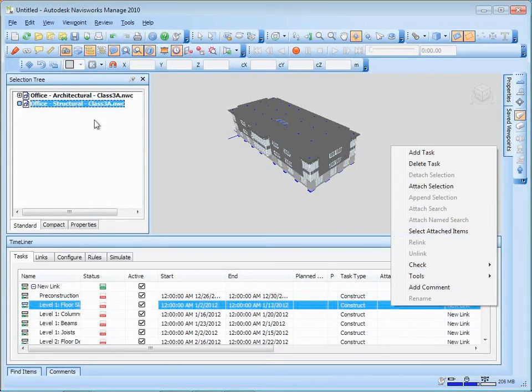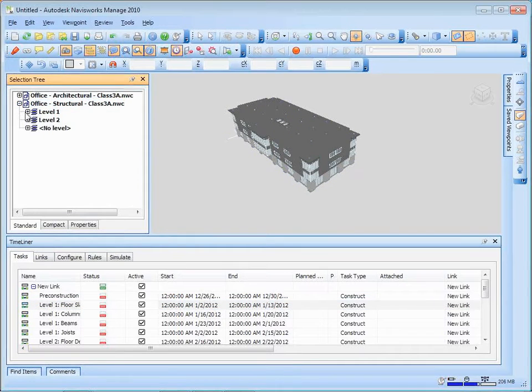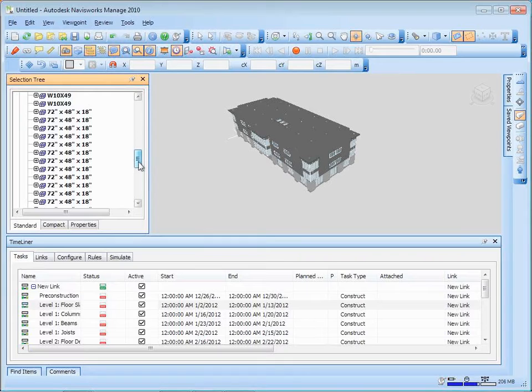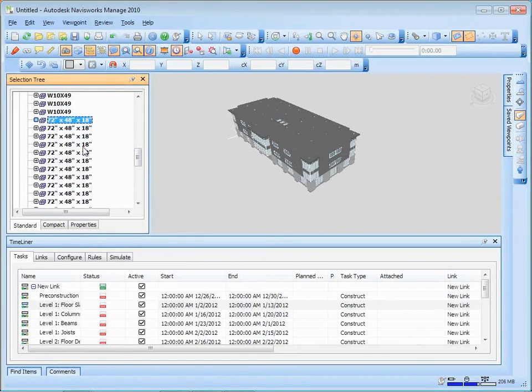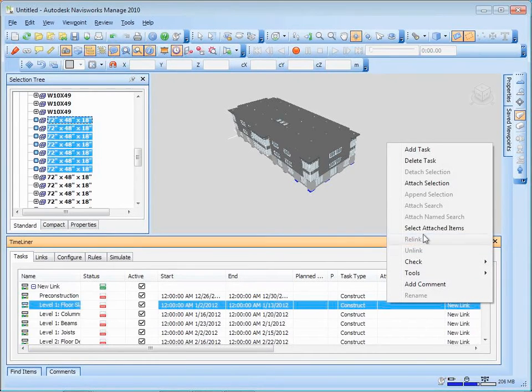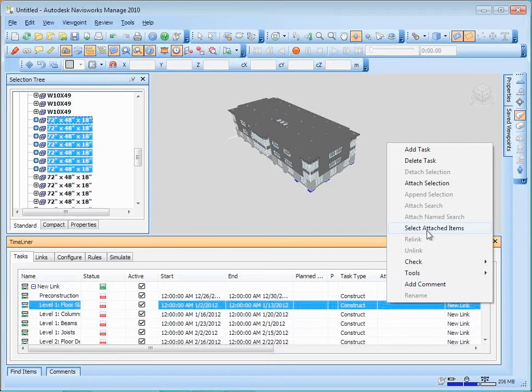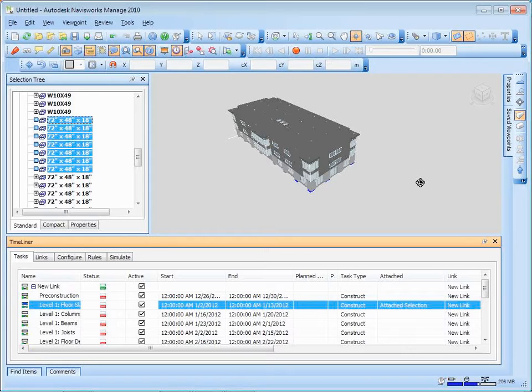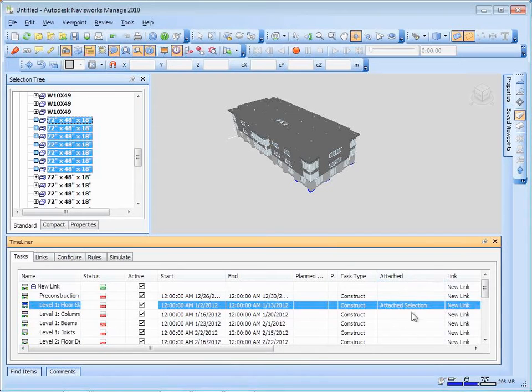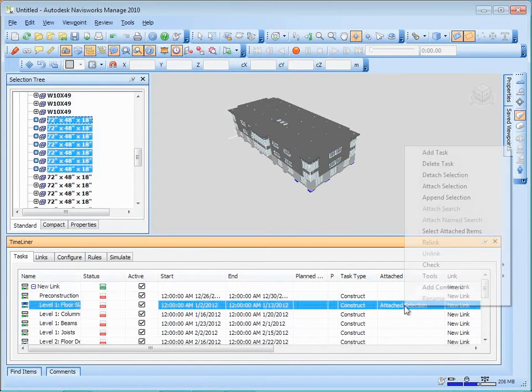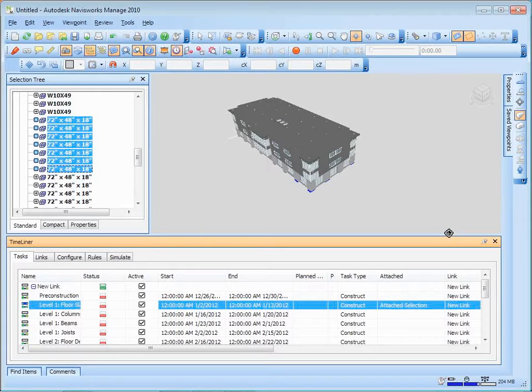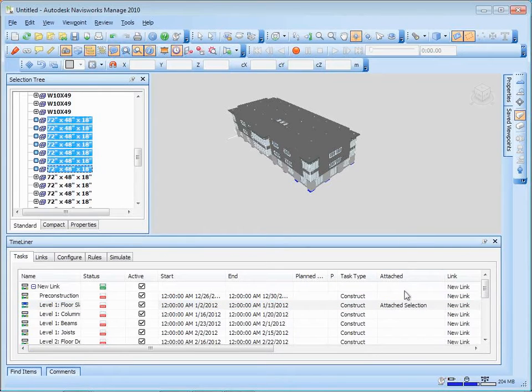And if for the first floor slabs and foundations you click over here, I can go through and actually attach items to it. So let's think about that. I could go through and up here in the model select some items and attach the items to that task. Okay, that's kind of okay. That's a starting point. So I could come up here and say that, you know, I'm going to level one. I'm going to go through and choose some different items over here. Okay, and I can come down over here and say, let's attach those items. Select attached items. Attach selection. And that'll bring those in there.